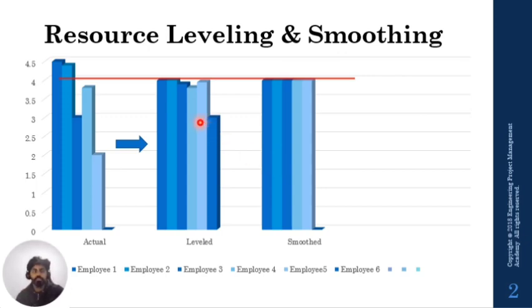In the case of leveling, the hours of the employees are the main criterion, and you slightly modify the deadline. So these are the two ways. As a project manager, it's up to you, based on the criticality of the project, agreements with the customer and the timeline, to decide what exactly you would like to achieve and what resource balance you want to bring into the project.